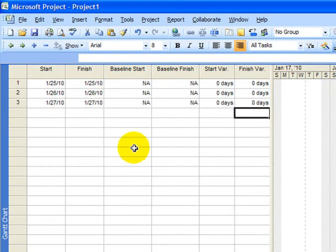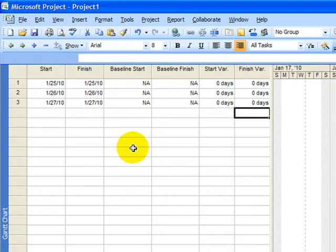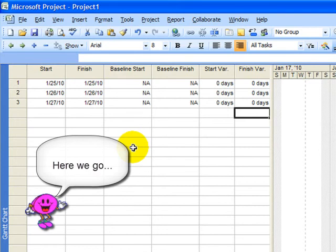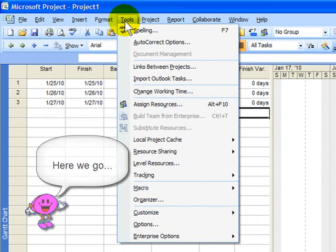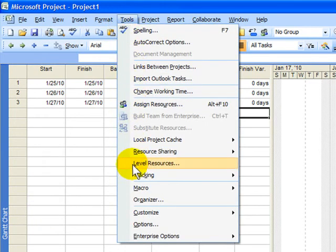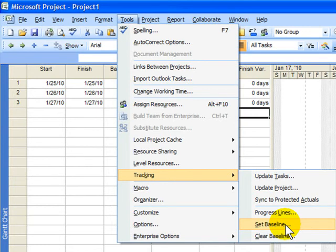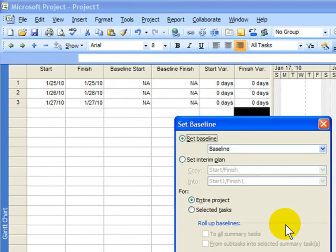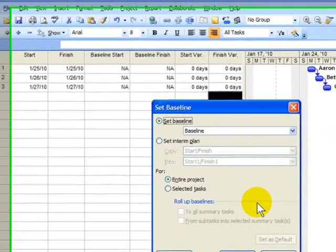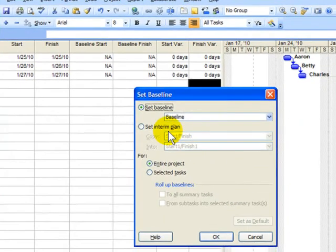And since you may have reached that point in your planning where the project is starting to come into focus, you need to save the baseline. And that's by going underneath the Tools menu and choose Tracking and choose the menu choice that says Set a Baseline. I'll click that and the window will pop up that enables me to set a baseline.